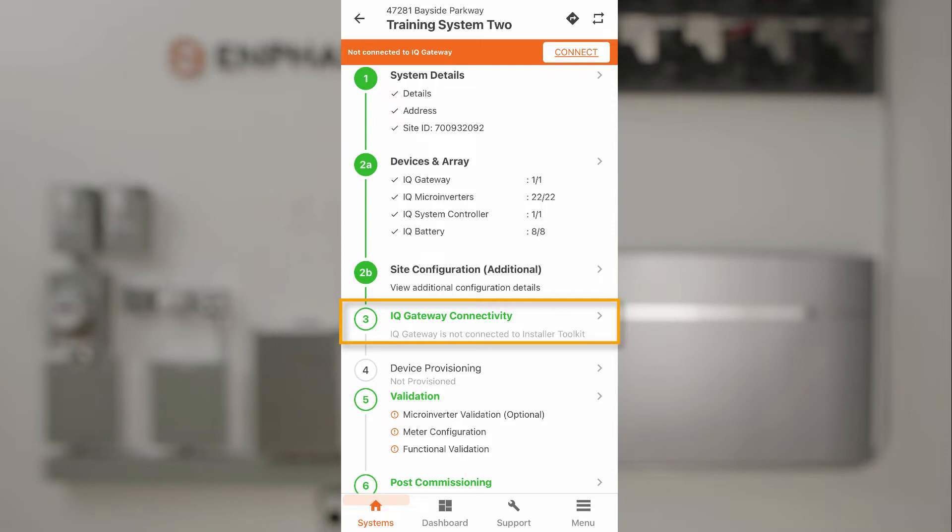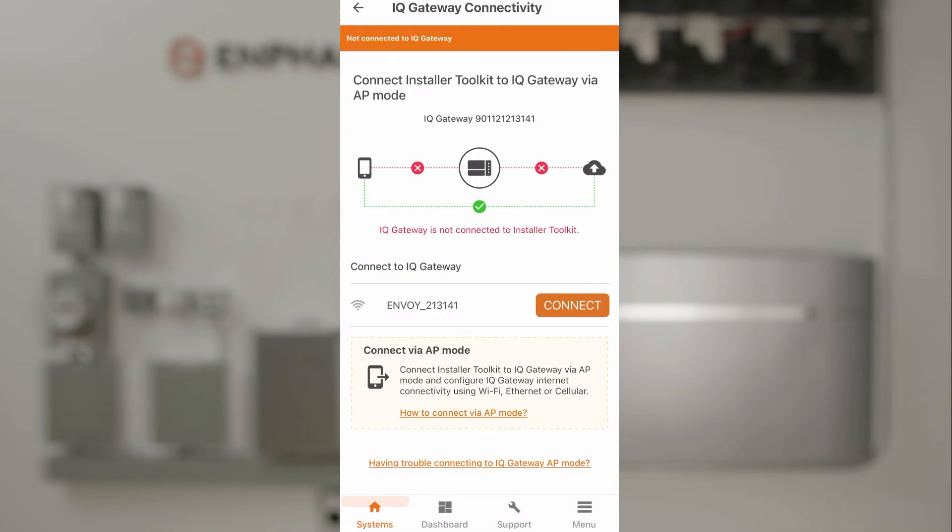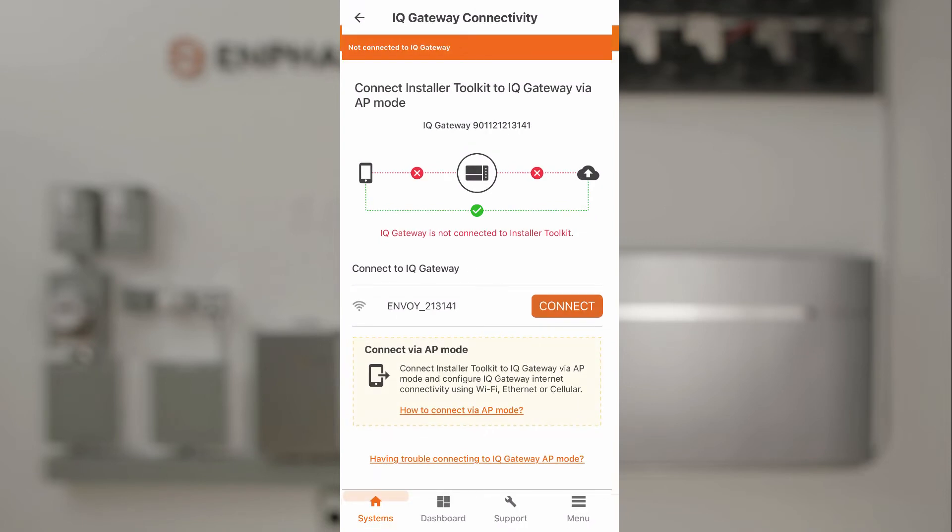Access the system on the installer app and tap IQ Gateway Connectivity. For the installer app to connect to the IQ Gateway, we need to first turn on a function called AP Mode on the IQ Gateway.